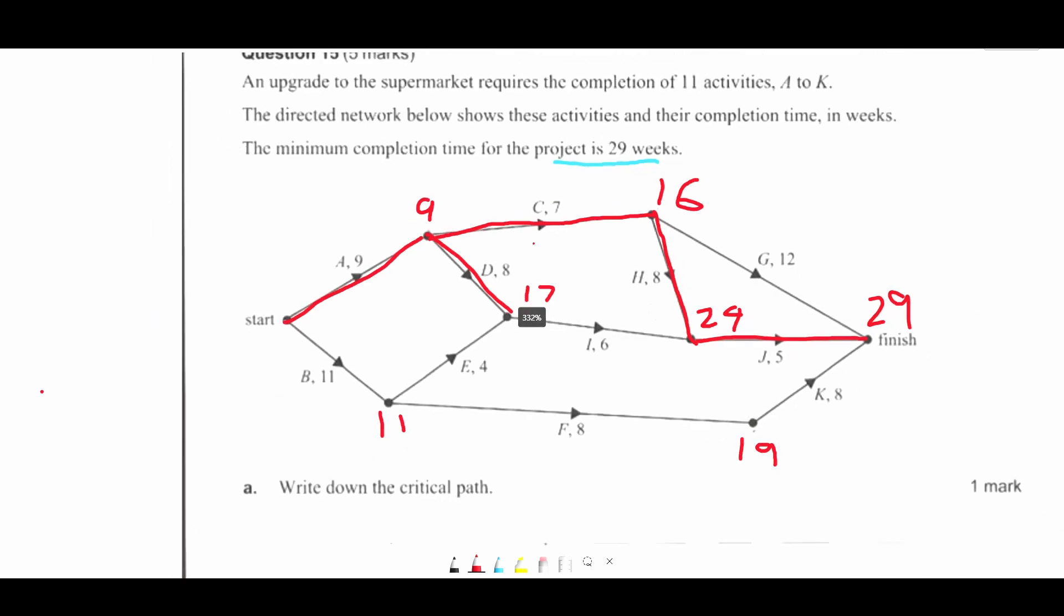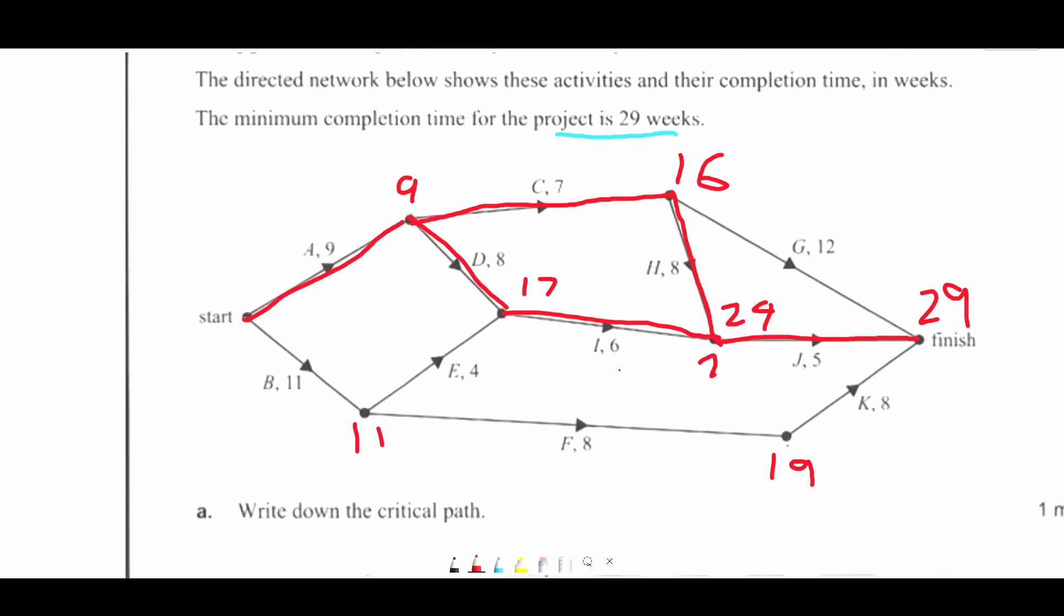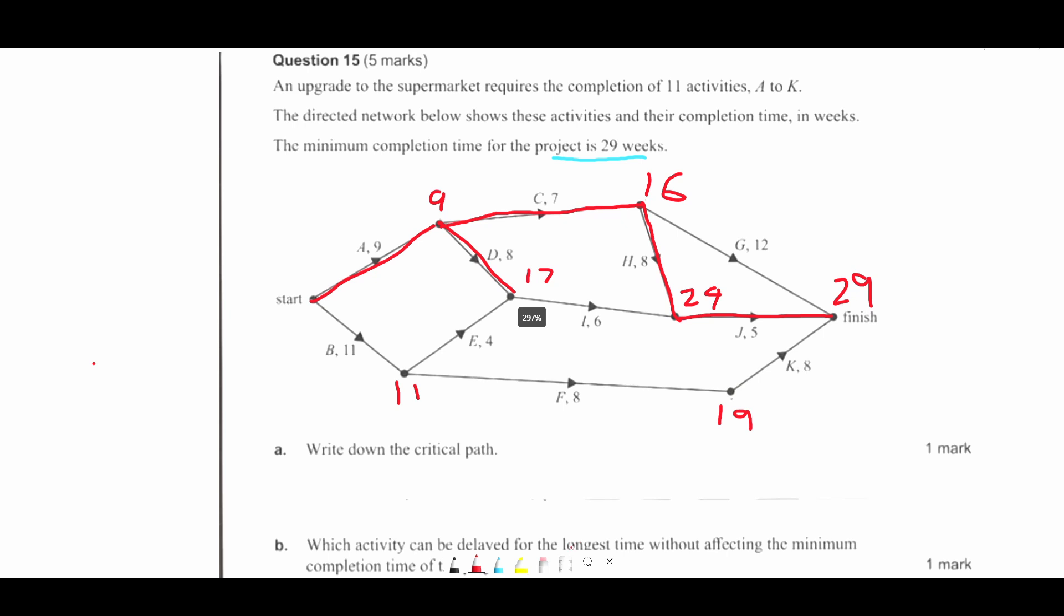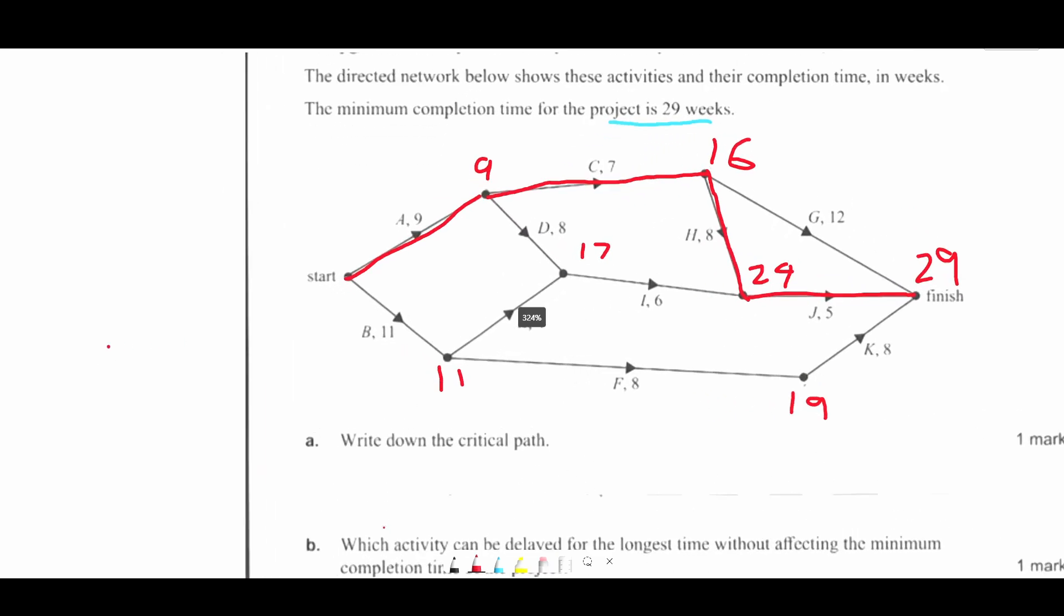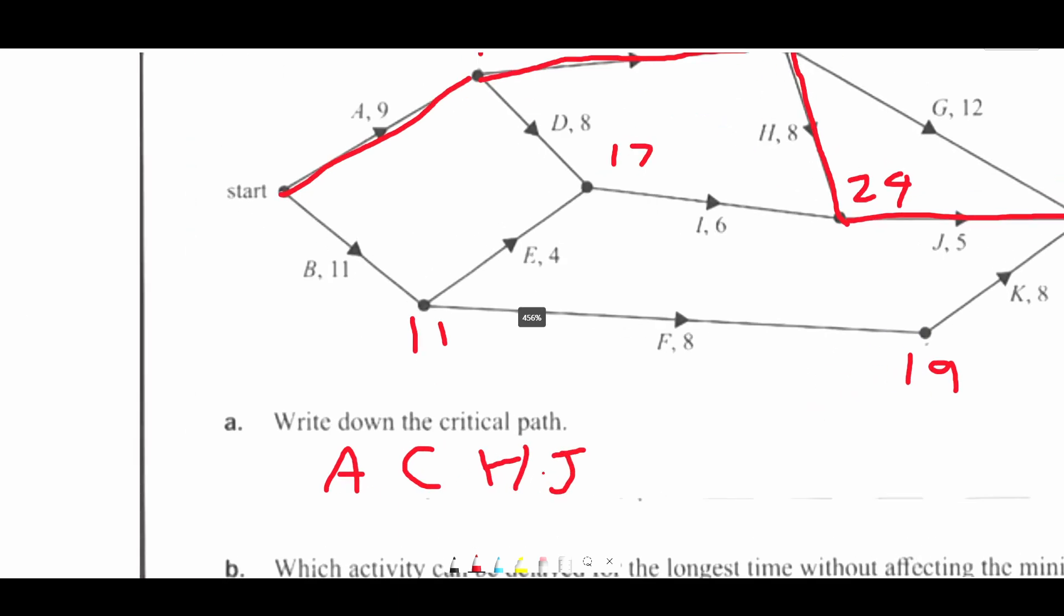So going down this way would be 23. That's not on the path. So therefore our critical pathway is going to be A C H J. I'm not really sure if you're going to add these dashes, but it wouldn't matter either way.